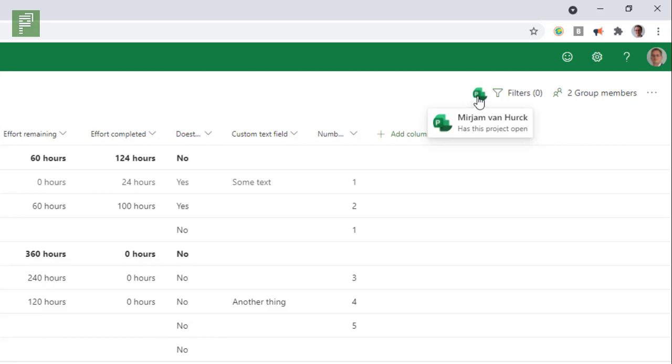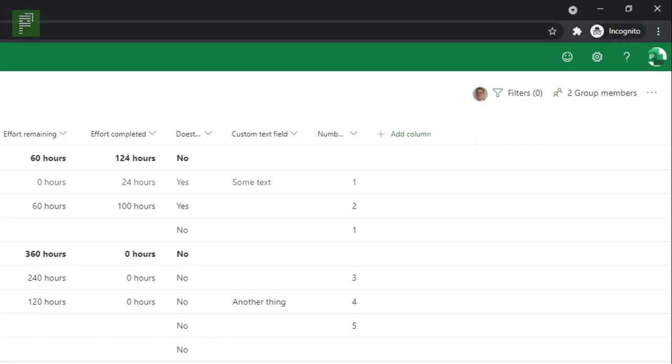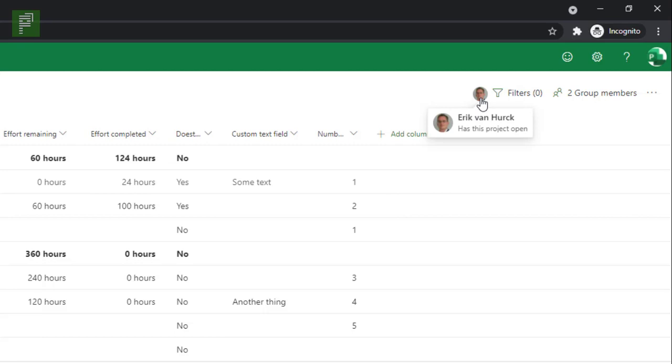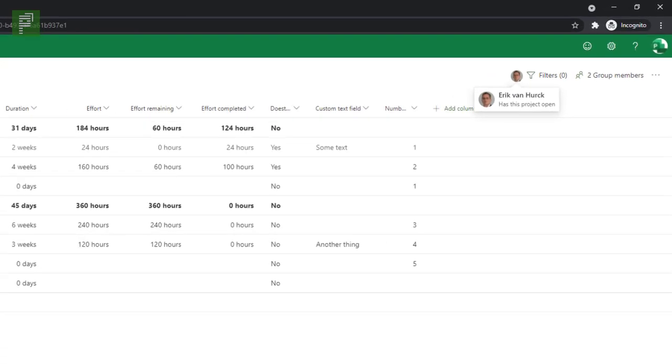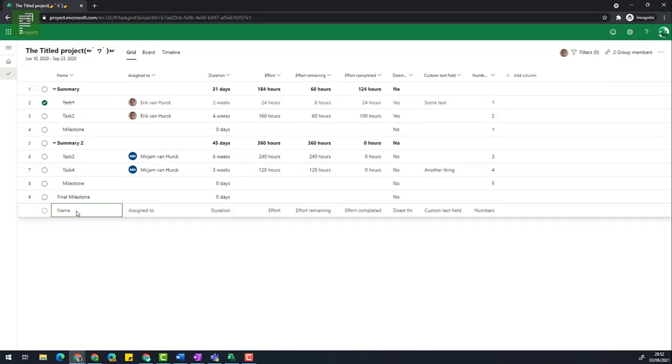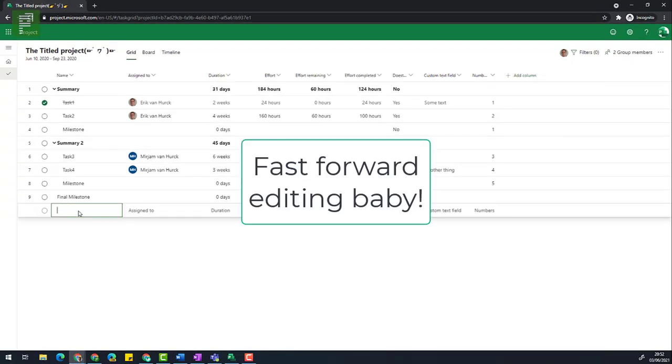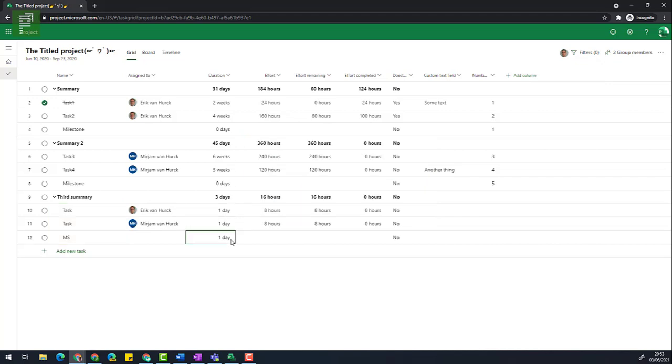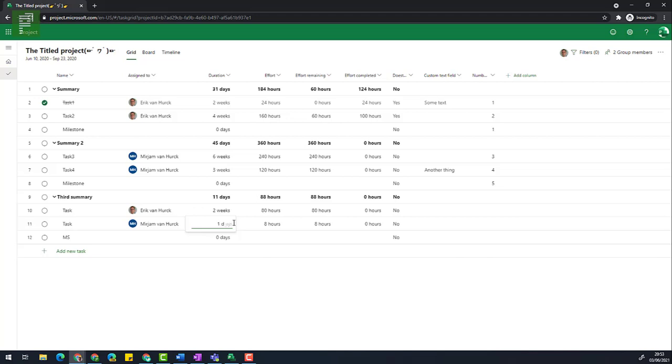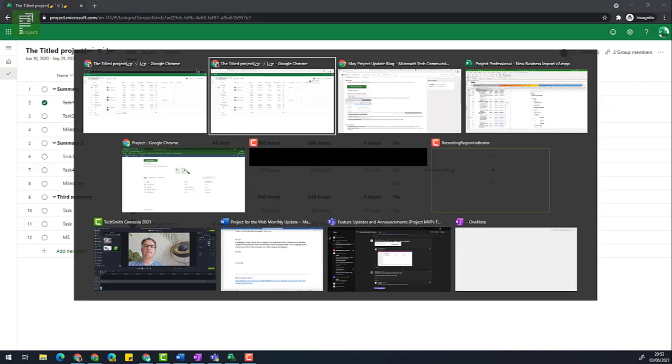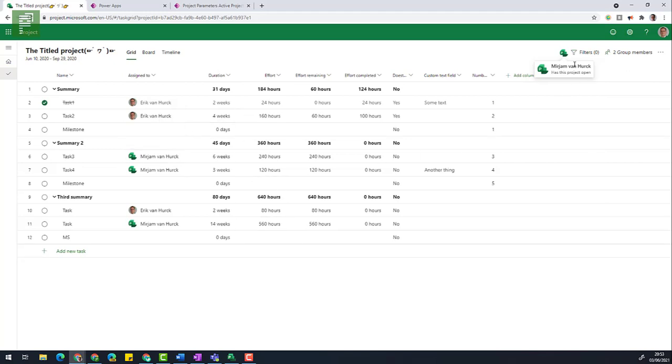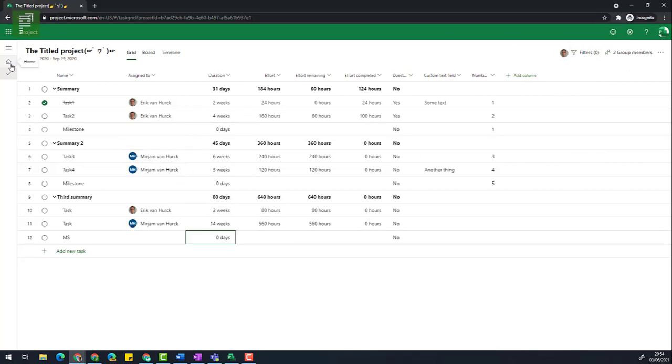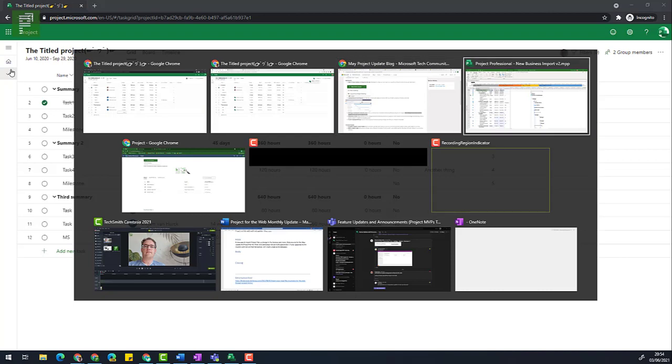This is actually a very nice little improvement of project for the web, because project for the web is multi author sensitive. So if I open the project in Miriam's situation, I'm currently logged in as Miriam, and I see myself here. So Eric van Herk is currently looking at the schedule as well. So Miriam can now add a third summary, link them together, and I can change the duration of this task to zero days, representing a milestone. All these changes are done by Miriam. So I'm wondering if I navigate back to Eric, will I see those changes popping up? And the answer is yes.